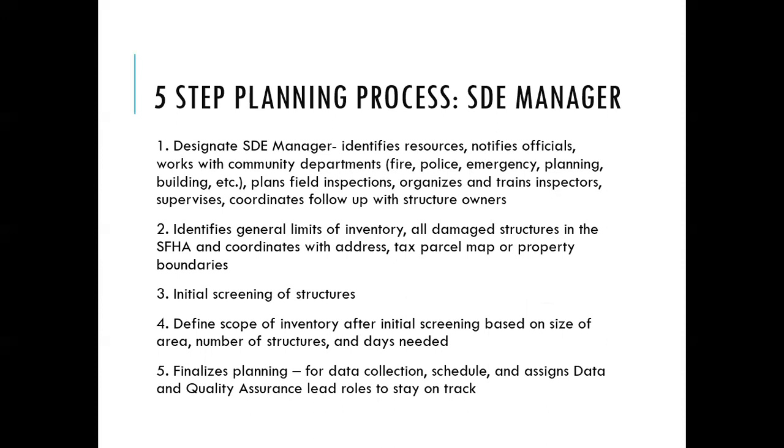And so this is the process that I've pulled from that guidance on what the planning process looks like after something happened. So you have the SDE manager who's basically overseeing all of the assessments and managing the team. So that's typically going to be the floodplain administrator, so probably yourself. So that person is designated and they identify the resources that are going to be needed. They notify the community officials and work with those other departments, especially like police and emergency. Those departments will be pretty important to conducting safe assessments and making sure that you're coordinating with the other community departments and that you're all giving consistent information and those types of things.